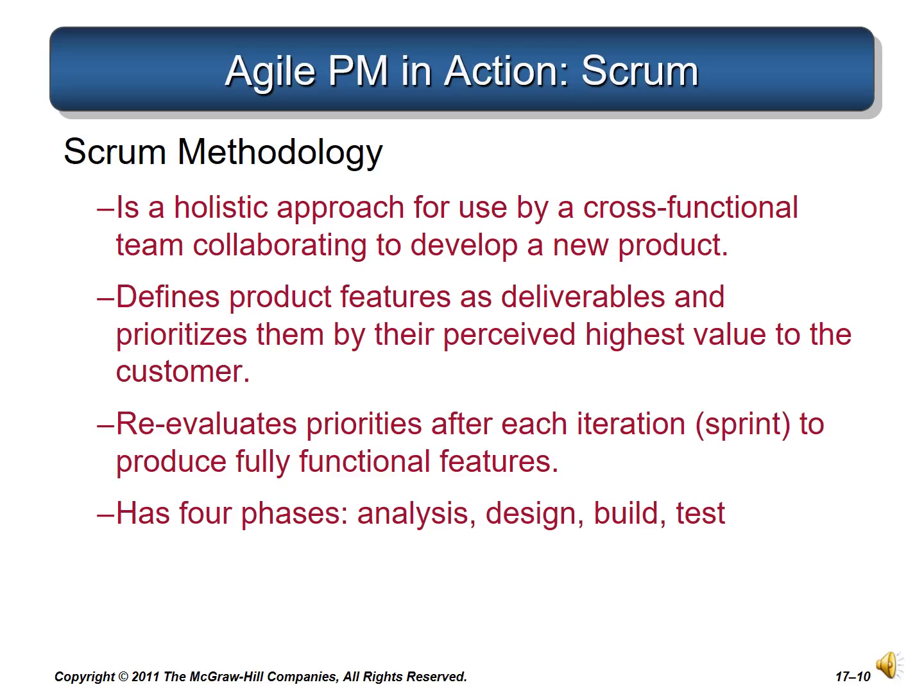Scrum, like other agile methods, begins with a high-level scope definition and ballpark time and cost estimates for the project. The scope and the cost estimates should be complete enough that management is comfortable with the estimates. The theory is that since requirements evolve over time, detailed upfront planning will be wasted. In place of product work breakdown structures, Scrum uses product features as deliverables. A feature is defined as a piece of a product that delivers some useful functionality to the customer.